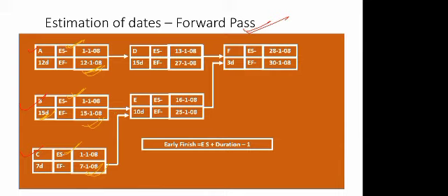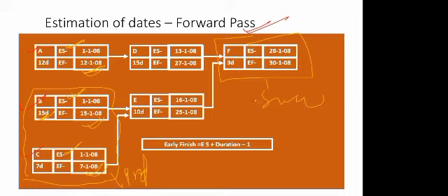And then if this is the E activity, and when you say these are what, these are the predecessors, right? ये क्या कहलाएंगे आपके predecessors, and for E this F is what, successor. So this is the successor and predecessor thing. जो एक्टिविटी आपकी आगे आने वाले टाइम पे स्टार्ट होने वाली है, that will be called a successor, and जो एक्टिविटीज आपकी पीछे उस एक्टिविटी के पहले खत्म हो चुके हैं, they will be called predecessors. Now an important thing to note here, we have E activity, right? And we are having two predecessors, B and C for this E, right?